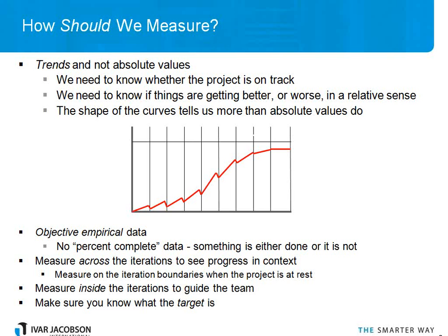We don't want to know when something's half done. So a lot of the earned value metrics that you see are based on assumptions that documentation is worth 50% of the value of the project. With iterative projects we focus very much on the real results, primarily what we can ascertain from the amount of working tested software that's been produced.